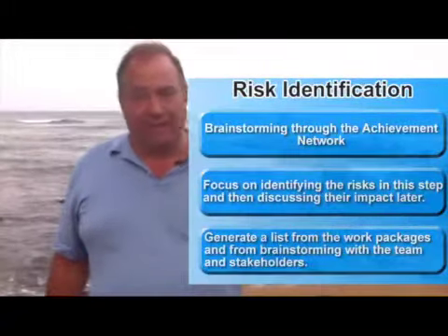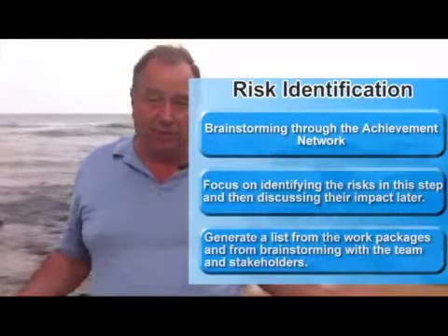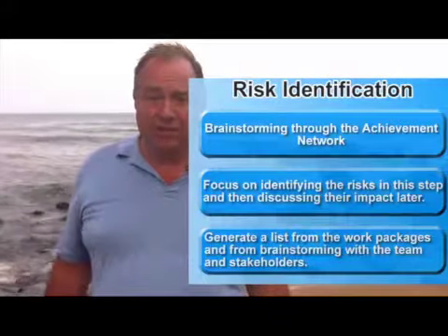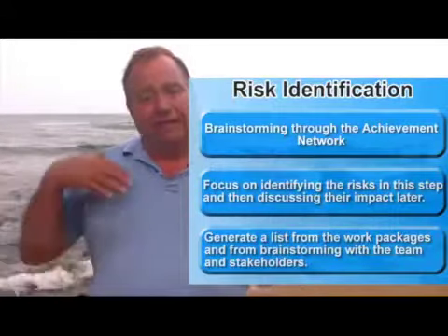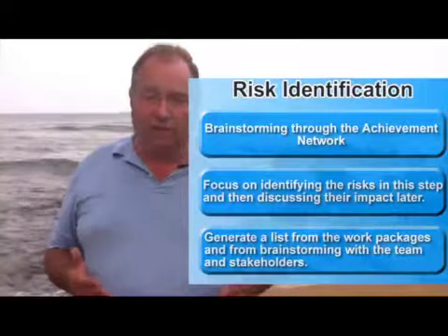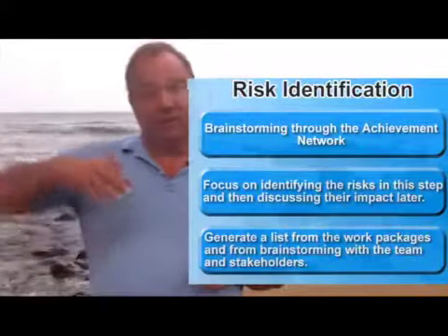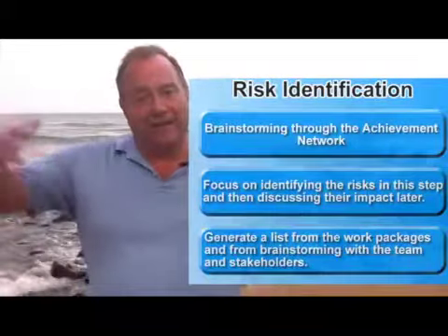And we're going to spend 10 minutes on risk identification, and that's where we're going to sit around maybe with the project team, maybe the team and the sponsor and some of the more significant stakeholders and say, let's spend 10 minutes and talk about the risks this project faces that could cause us to take a great deal more time or spend a great deal more money, because we want to identify those risks now.